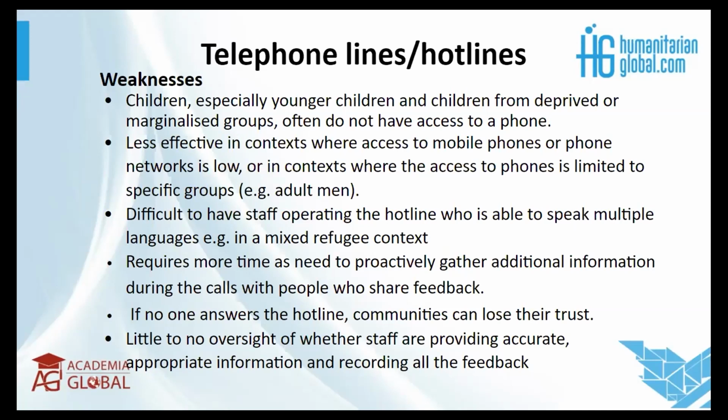And then again, you can also have two staff instead of only having one staff, because this can overwork a person, especially in times of crisis, and in times where there's a lot of complaints coming in. At the same time, you can make sure that not one staff is overwhelmed, or have them share responsibilities in terms of recording the feedback. They can have a notebook, and then someone else can help them with the data entry and have a way of channeling this to the responsible persons.